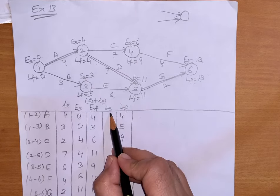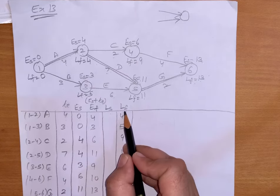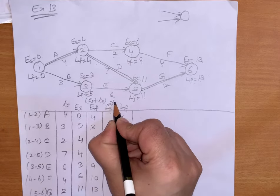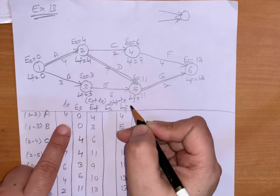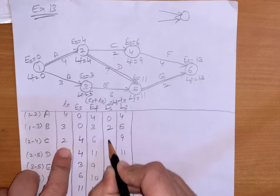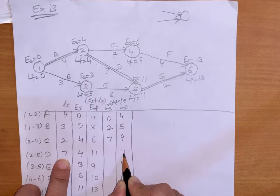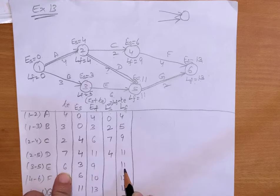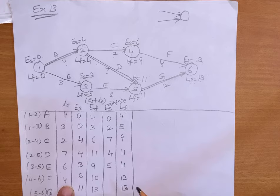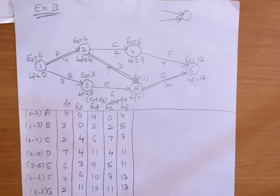Now, how to find out latest start: the formula is latest finish minus expected time. So: 4 minus 4 equals 0; 5 minus 3 equals 2; 9 minus 2 equals 7; 11 minus 7 equals 4; 11 minus 6 equals 5; 13 minus 4 equals 9; 13 minus 2 equals 11. So we have now calculated latest start and latest finish.